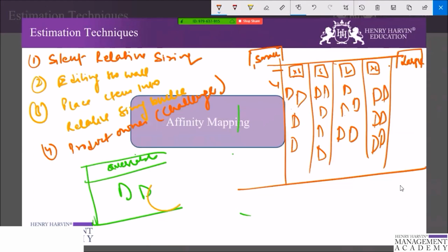And it is important to tell the product owner and their supporter that the word challenge is not to disrespect the estimate of the team. So be careful how you approach the challenge, and make sure that you are communicating what about the team's item size was not in line with your thought of its size. So you can even play planning poker, and that may be noticed by the team while they are challenging the item. So when the team gets back from the break, have them get comfortable and allow the product owner and supporter to ask about items they have marked on the wall.